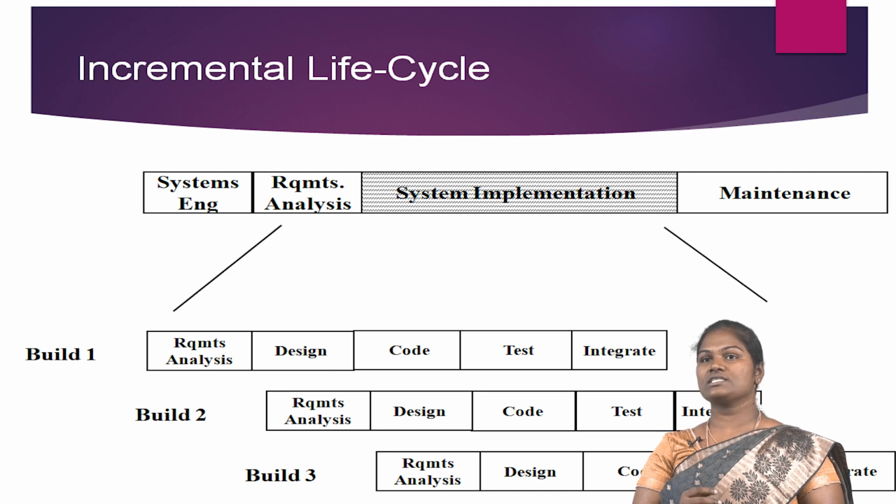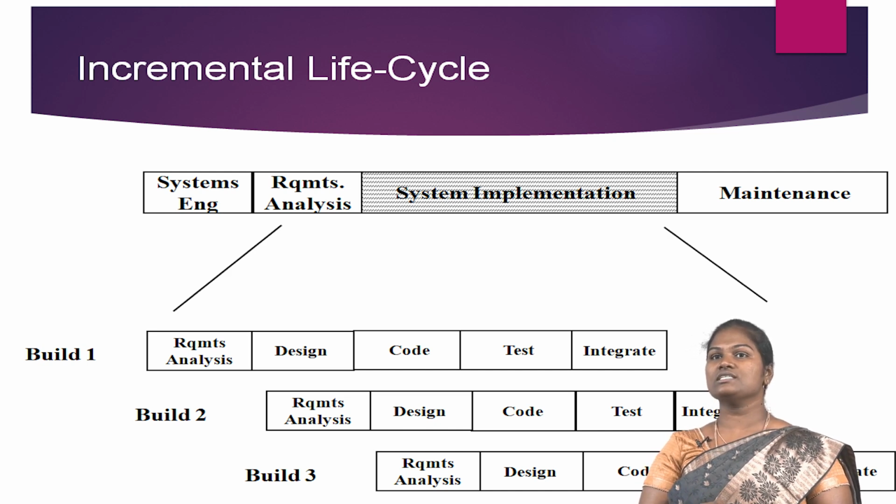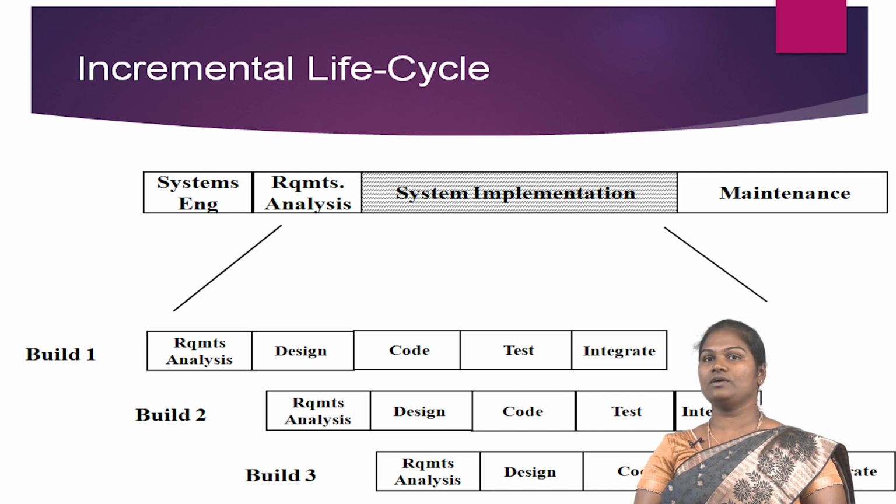This life cycle is driven by risk management. It recognizes that there may be many uncertainties in the project and works to reduce the probability of negative impacts due to those uncertainties. Risk analysis is performed to identify, analyze and rank risks. Risk mitigation identifies actions to be taken to reduce the amount of risk, resolving risk through planned corrective actions, and monitoring the situation to see if the corrective actions removed or reduced the risk as planned.